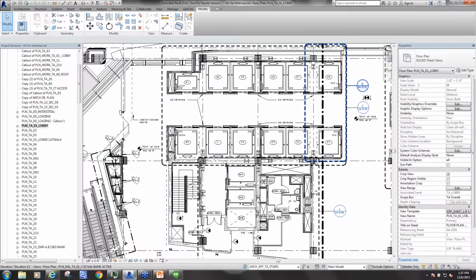What came out of that is a very reliable interactive model that still to this day, as of yesterday, is referenced on a daily basis in documentation, meetings, submittals, RFIs, shop drawings that come in for the design team, and additional design changes that happen as different tenants come in and these elevators need to go to different places. Some of these usages were literally changed yesterday morning, and the model is already accurate, the schedule is accurate, everything that needs to go out is accurate.